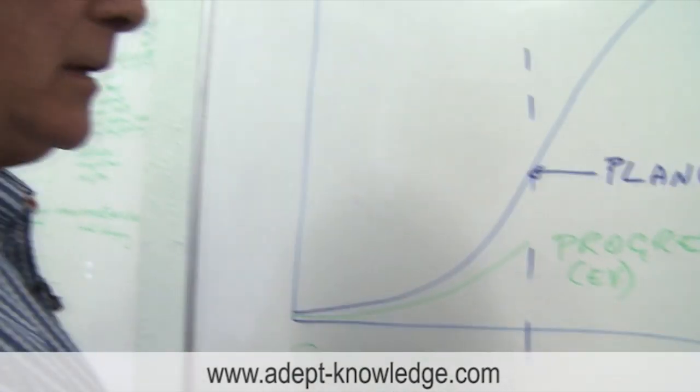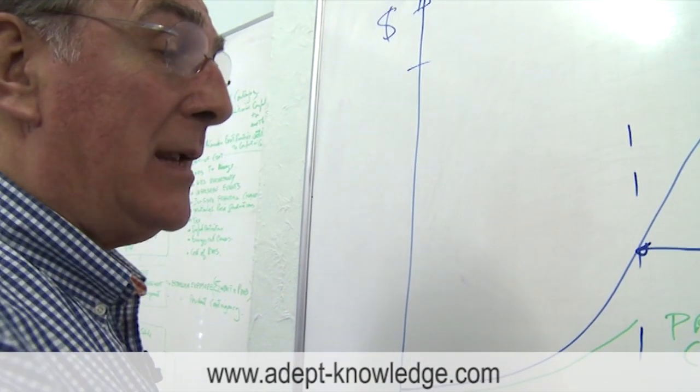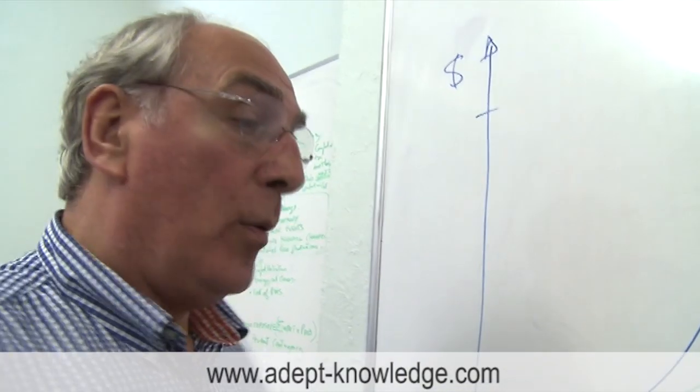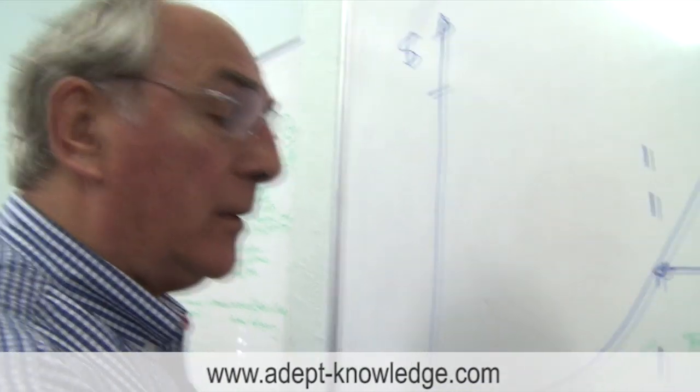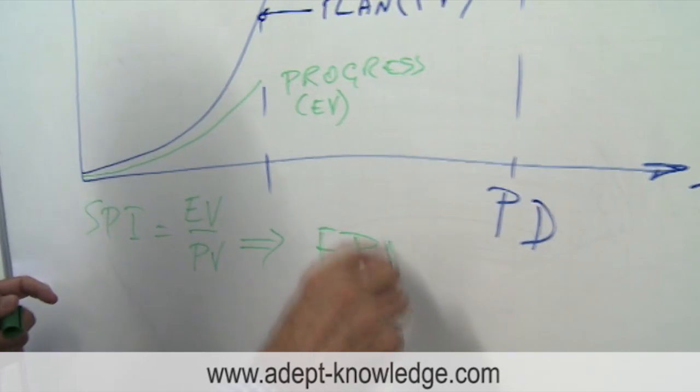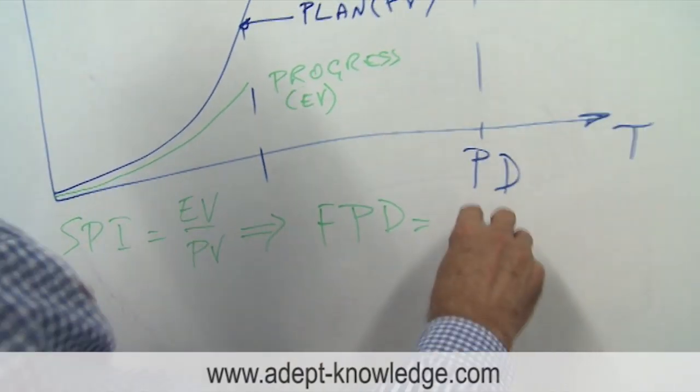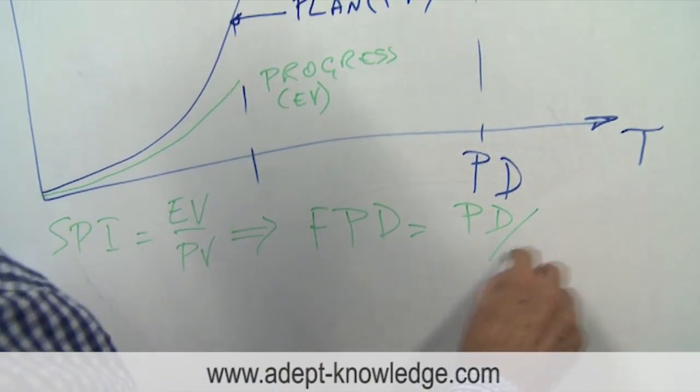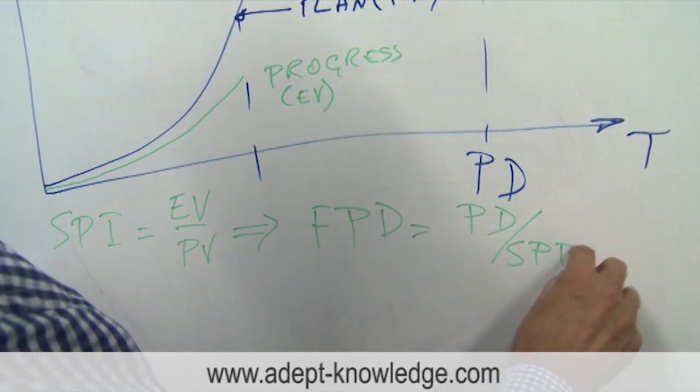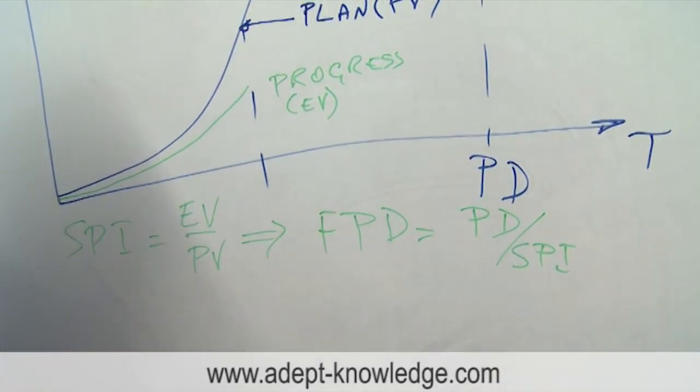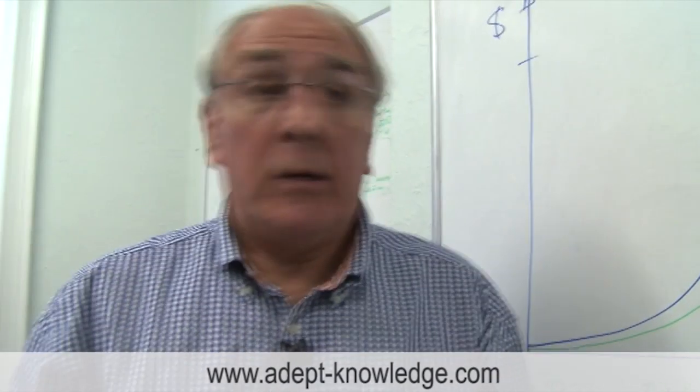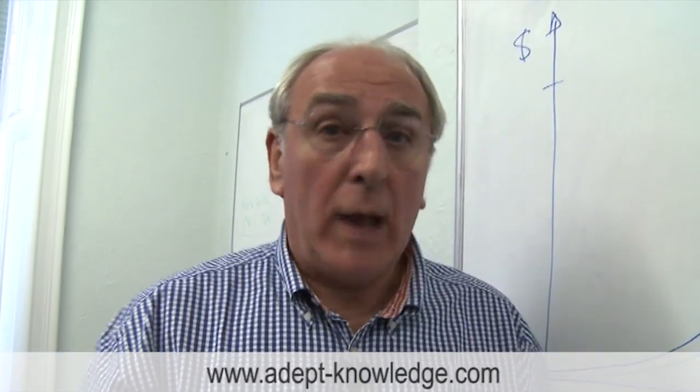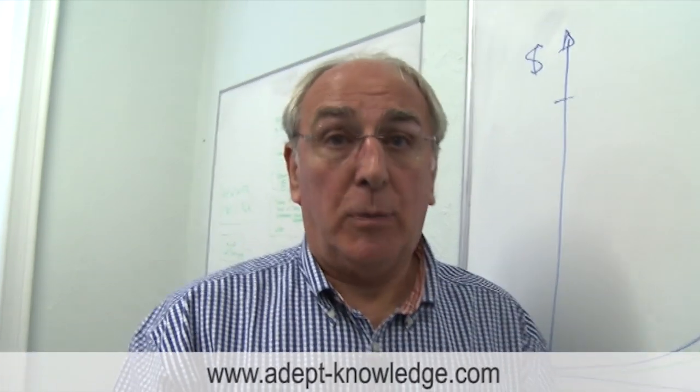And then using that index, if we simply take the project duration and that index of performance, what we can do is make a forecast of the project duration. And that is simply the project duration divided by this schedule performance index. I think that's a pretty important index because this is really your effectiveness. How well are you doing in relation to what you plan to do?